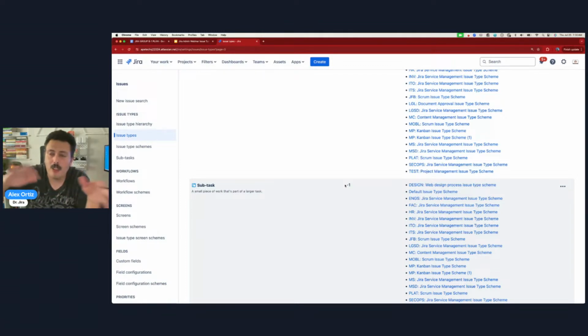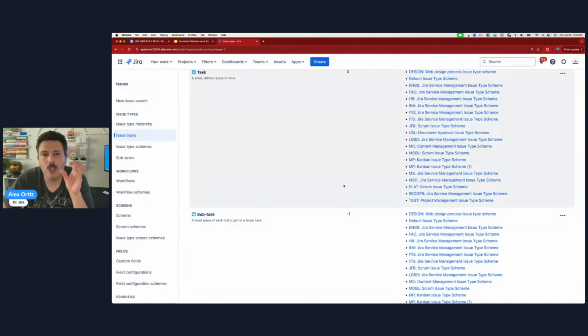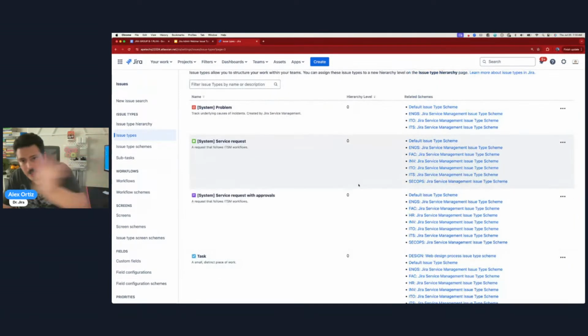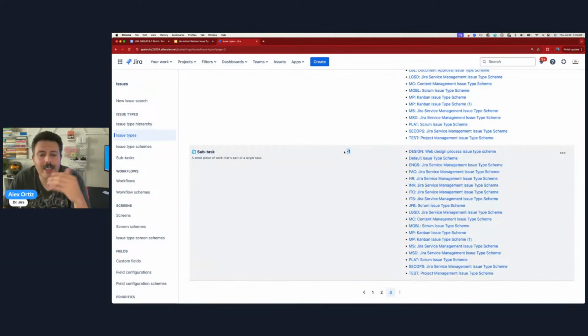And yes, spoilers, we can go up above. We'll talk about that in a second. We can create more levels, right? But the Jira is going to respect this order, right? And so all you need to worry about, if you're on Jira Standard or Jira Free, specifically in the cloud, all you need to worry about is that the epic is at the highest. Everything else is going to be level 0, and then you will occasionally make a level -1 issue type, right?